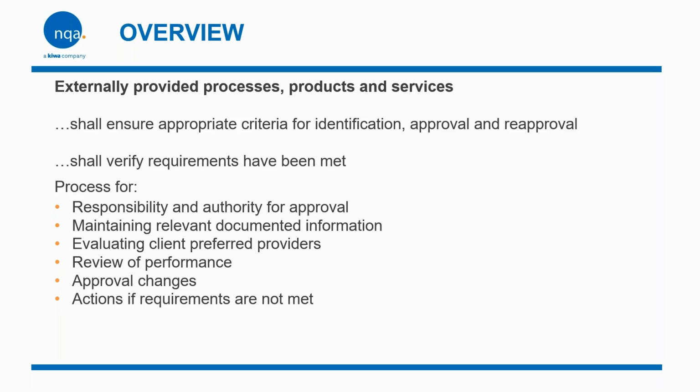One of the things in construction, you might not be able to use your own preferred providers. The client might be using preferred providers. And if the client has preferred providers or mandated suppliers, organizations should have a process to evaluate these providers, integrate them into the project supply chain appropriately, and ensure they comply with quality and project requirements.